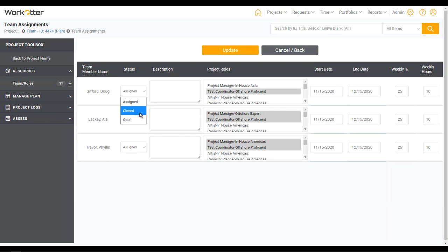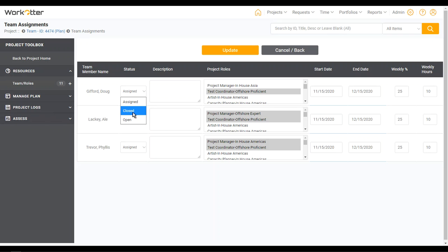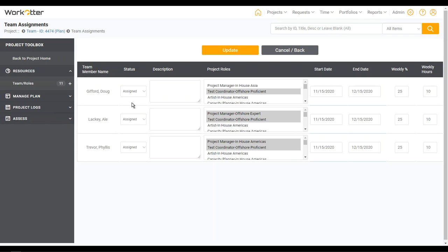I can also change the assignment status. Please note, if you use a template, everybody comes in as open, meaning it's a soft booking — they're not formally established on this project. Remember that your team member licenses can only see the projects they're assigned to, so if somebody's open or closed they're not going to have access to it if they just have a team license, unless you change it to assigned. But if you create your own brand new team members on your own brand new project, it defaults to assigned. Also note, this controls whether time can be entered against these projects, so be mindful as you set the status.